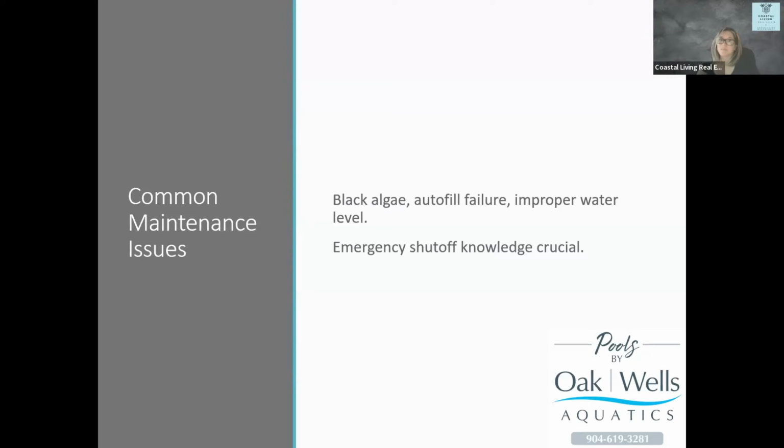That's a huge one. So we're still working on a project down in Daytona Beach, and it was a storm damaged pool from almost 3 years ago. In that case, we had to do some structural work on that swimming pool, and that swimming pool fell seaward of the CCCL line, which is the Coastal Construction Control Line. That's governed by the DEP, Department of Environmental Protection. So I had to get a letter from them, and then I could submit to the state health department.